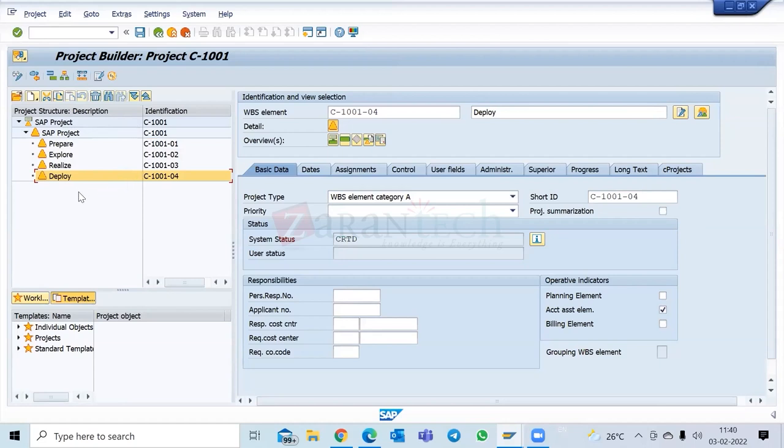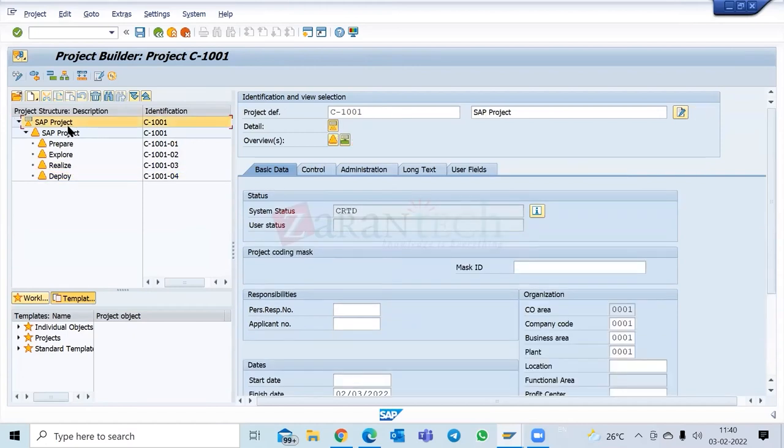So the cost will get booked in those different company codes, but as a project, you will see the cost. Let's say this US part was 1 million, the UK part was 2 million, and the India part was 4 million. So totally as a project, I can see 1 + 2 + 4, that is 7 million, as one project. Got it? I got it.